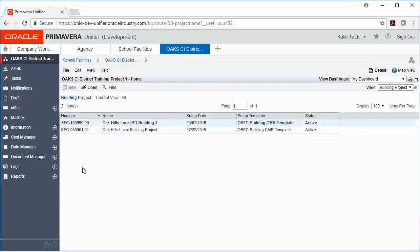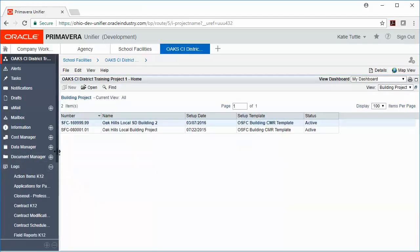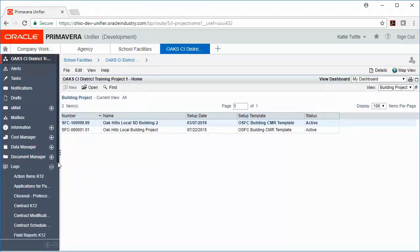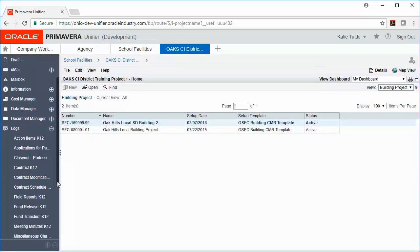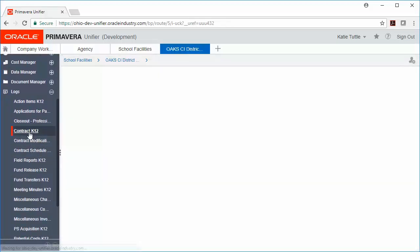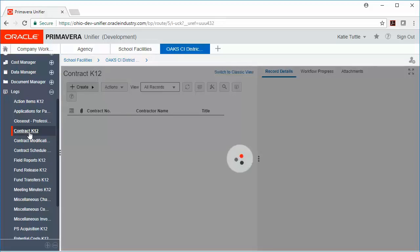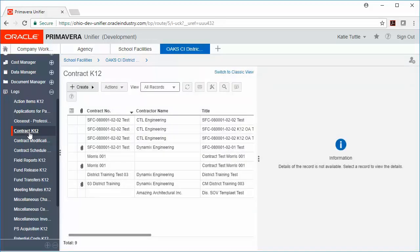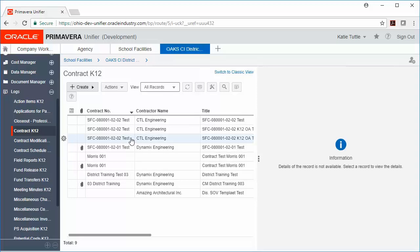When speaking about my district-level project, these are always going to contain records regarding my professional service providers. So if I look in the district-level project at the contract, I'm going to see any contracts for professional service providers, such as commissioning agents or the architect or an owner's agent. This is also where those pay requests will be housed for those providers.